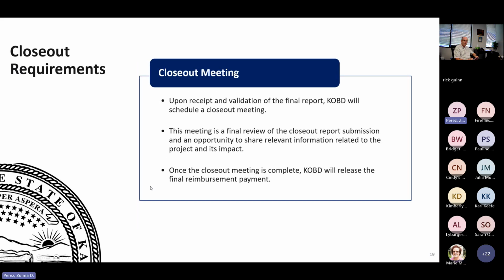Closeout meeting, there will be a meeting that's scheduled, the closeout meeting, and those are usually scheduled. KOBD will schedule a closeout meeting in conjunction with us. And this is just a final review of the reports, an opportunity to share any relevant information related to the project. And then once the meeting is complete, the final reimbursement payment will be issued.